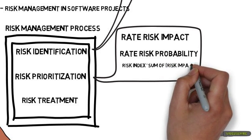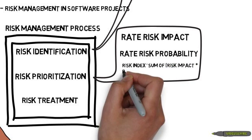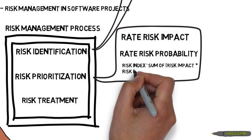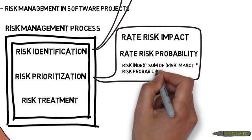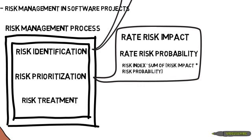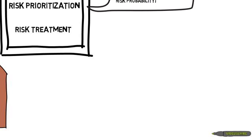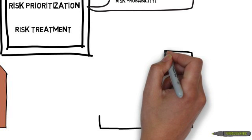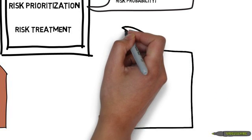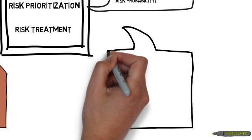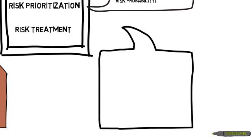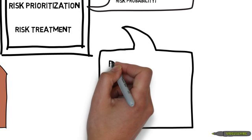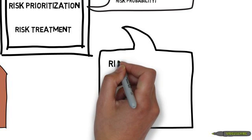When you add up the risk indices of each risk, you get the overall risk index of the project, which indicates how risky or not risky the project is.